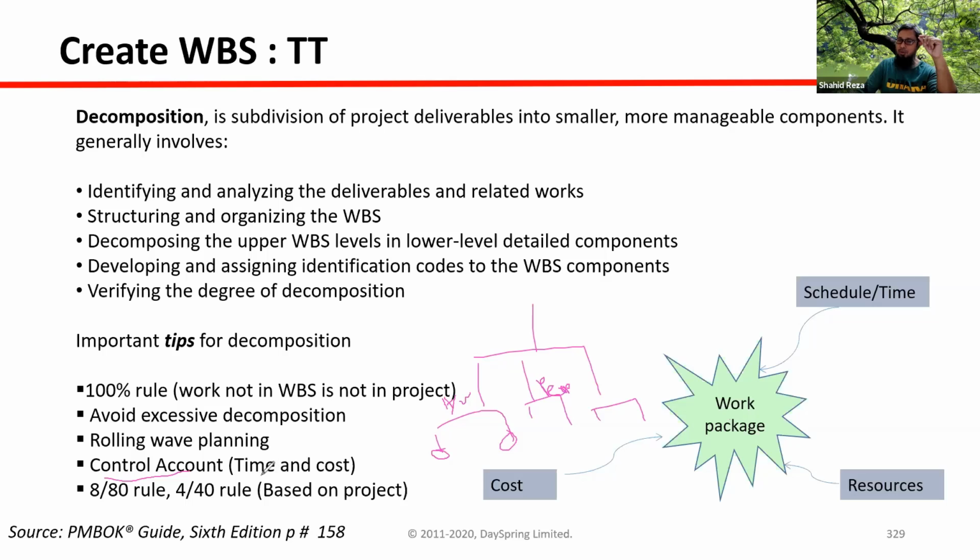Based on that control account, we measure. In Bangla we say a lump sum is allocated, for example 5 crore taka budgeted for hardware, 5 crore taka budgeted. So with this control account we can control whether that is exceeding the targeted budget or not. Even for this component we may set time, say for the hardware component we need 6 months to deliver in our data center.